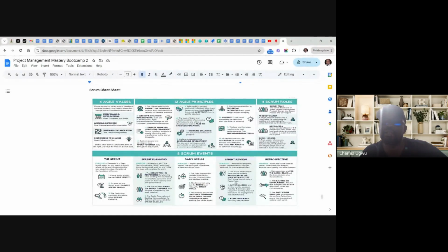You see it here: get organized, start on time, and be succinct. Plan for 4 to 5 minutes per completed backlog item and leave time for engagement with stakeholders.